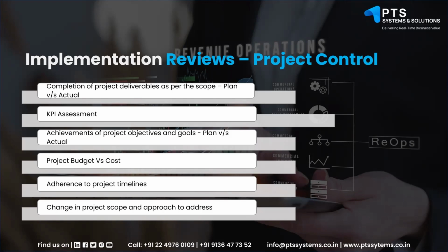And then the next criterion would be the cost involved in that particular change, and whether the availability of budget for the project allows me to make those changes. These are all important factors. Those need to be discussed in the implementation or support reviews.